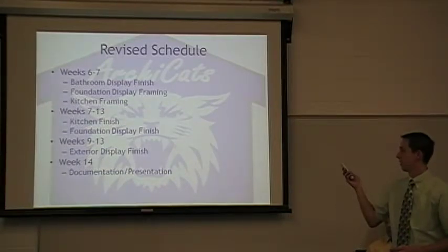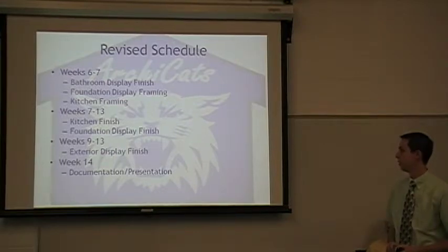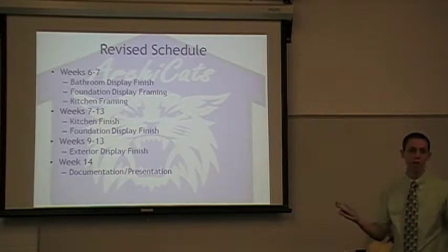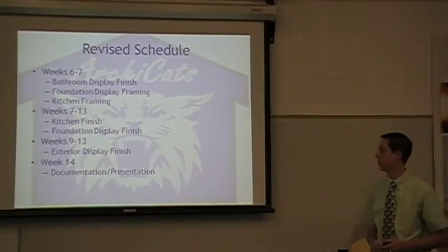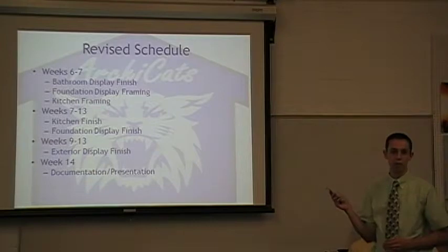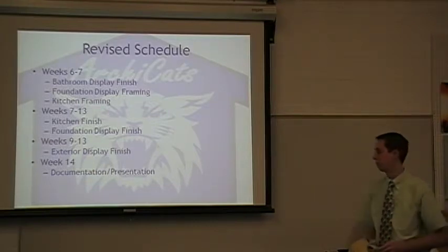That's a continuation of the revised schedule. We also tried to make sure that the exterior display, which you see in weeks 9 through 13, had the most time, because we knew that one was going to take a long time. So we wanted to get the other ones out of the way. For the bathroom and the kitchen, we knew we had to have plumbers come in, so we tried to push those back so we had a little bit of buffer. And then again, week 14 never changed, with the documentation and presentation.